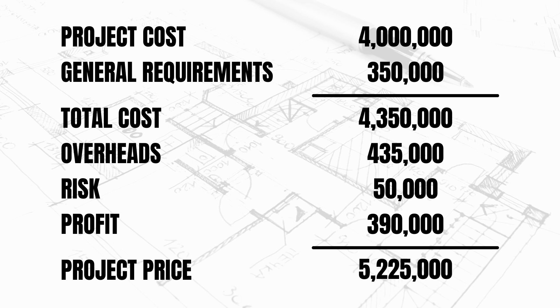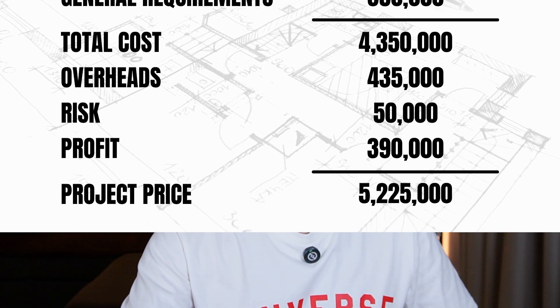Now it is time to add what we call the margins or markups. The common margins are overhead, risk, and profit. These three margins come on top of your cost to produce the final price for your project.